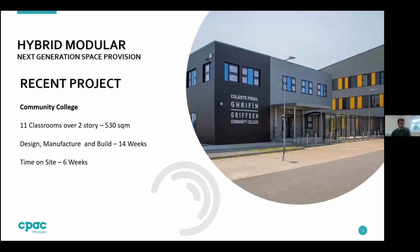So, a recent project that we've completed, and a bit of background on hybrid modular. A recent project there is a community college with 11 classrooms over 2 stories. The design, manufacture and build took us 14 weeks, and the time on site was 6 weeks.